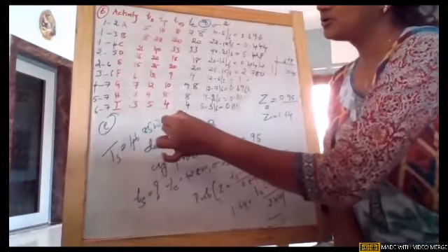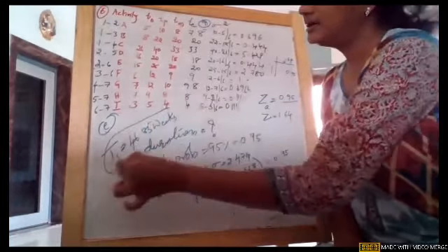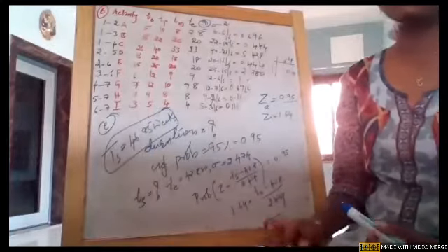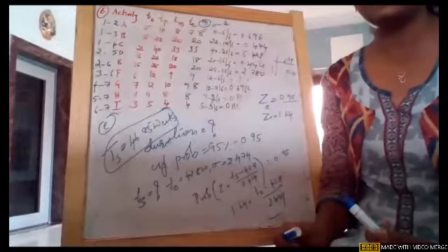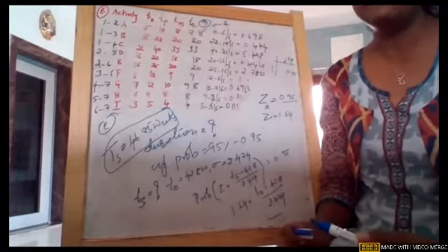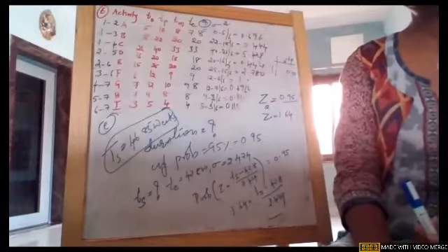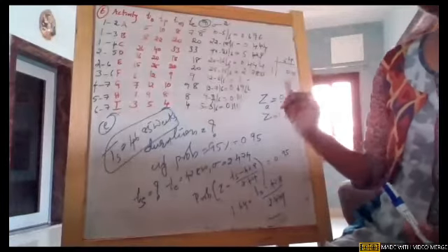46.85 weeks. So we can just understand at 95% probability that the duration of the project is 46.85 weeks. Girls, did you understand? Yes, ma'am. The little bit is you need to do it in reverse.